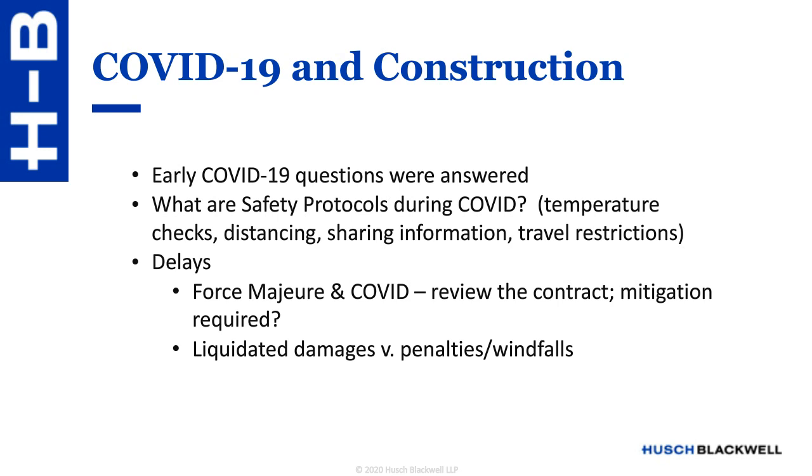Are the liquidated damages enforceable, or are they unenforceable as a penalty? The general rule was always that they were not enforceable, but the modern trend is that liquidated damages may be enforceable if they are correctly tied to the damage that occurs. You've got to really show the right connection. So that's another issue that's been coming up for our team, and that we could talk about more as we get to that more detailed presentation.